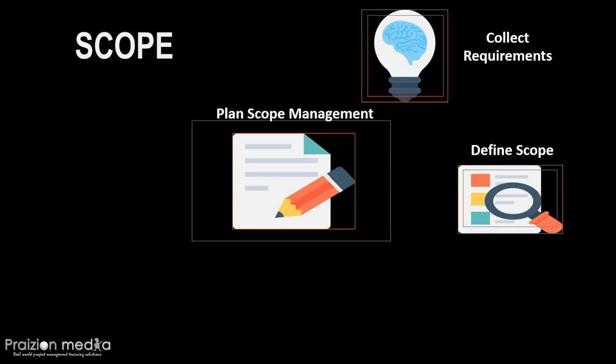What you want in the deliverable is different from the work that must be carried out to achieve the features in that deliverable. In define scope, our major output is a project scope statement. Now, do not confuse the project scope statement with the statement of work talked about in the Develop Project Charter process. Again, we're talking about two different documents.